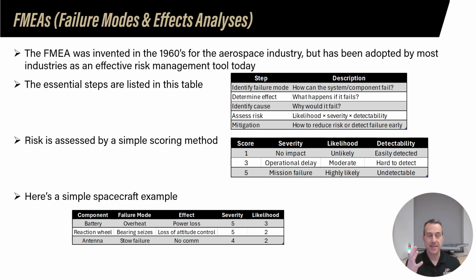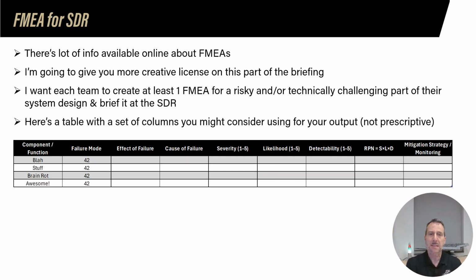there's going to be a determination of what is at the root cause of that. And then every other aircraft or spacecraft that has that component, you're on high alert because of that. And if you're designing that component into your system, in the design process, you might want to think long and hard about whether you want to switch that out at the last minute. Or if there's a way to mitigate that while still having that component in your system, but with high levels of awareness of what could happen. So that's failure modes and effects analyses in a nutshell.